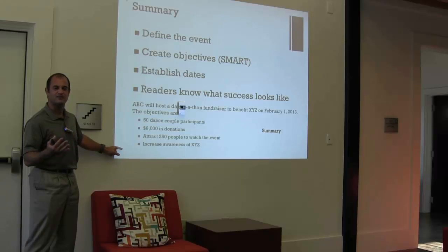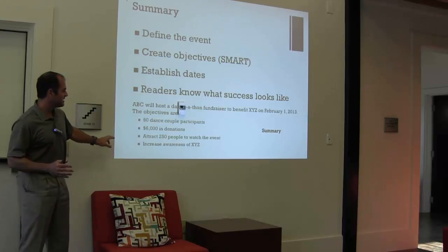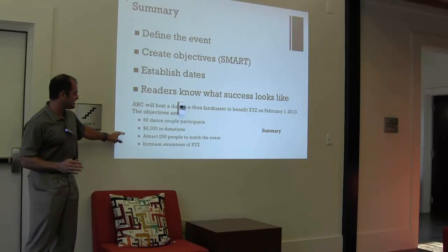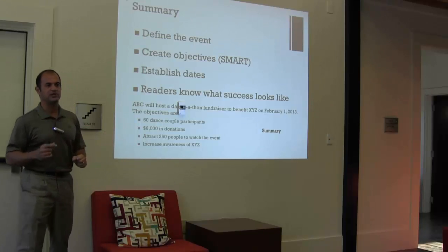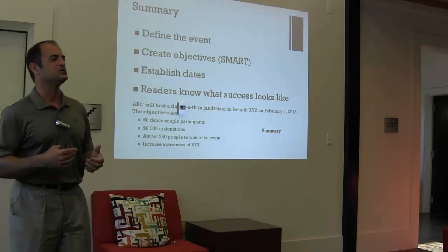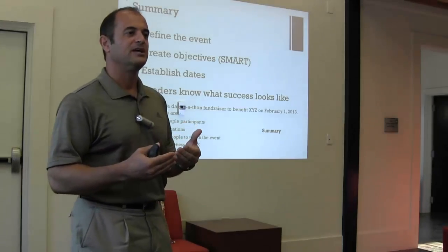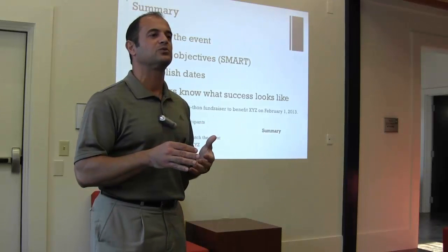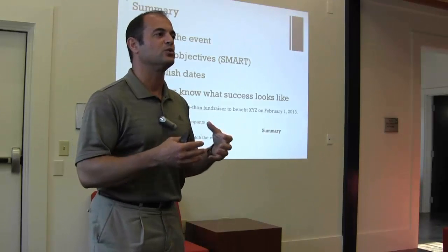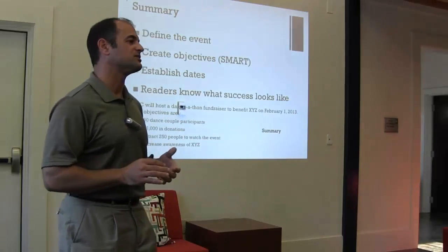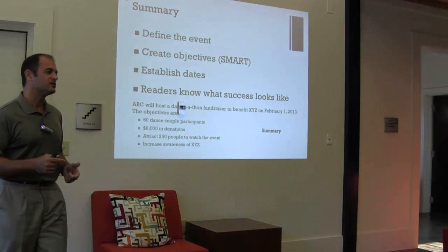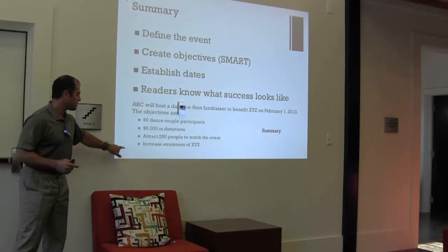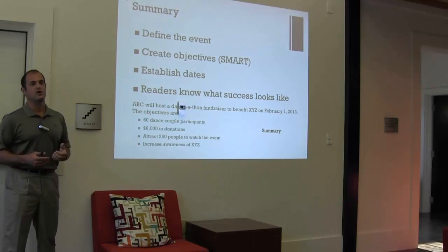How do I know whether I've increased awareness? Well, in this case, what I would suggest is this 250 people that are already associated with either ABC or XYZ, are these new people? You can actually count people, and if you have new people into an organization, that can increase awareness. I know a lot of our students want to do things that increase awareness to a cause, to an event, and there's not necessarily a hard number to it. Increase in awareness is measurable if you associate it with who in your audience is coming.